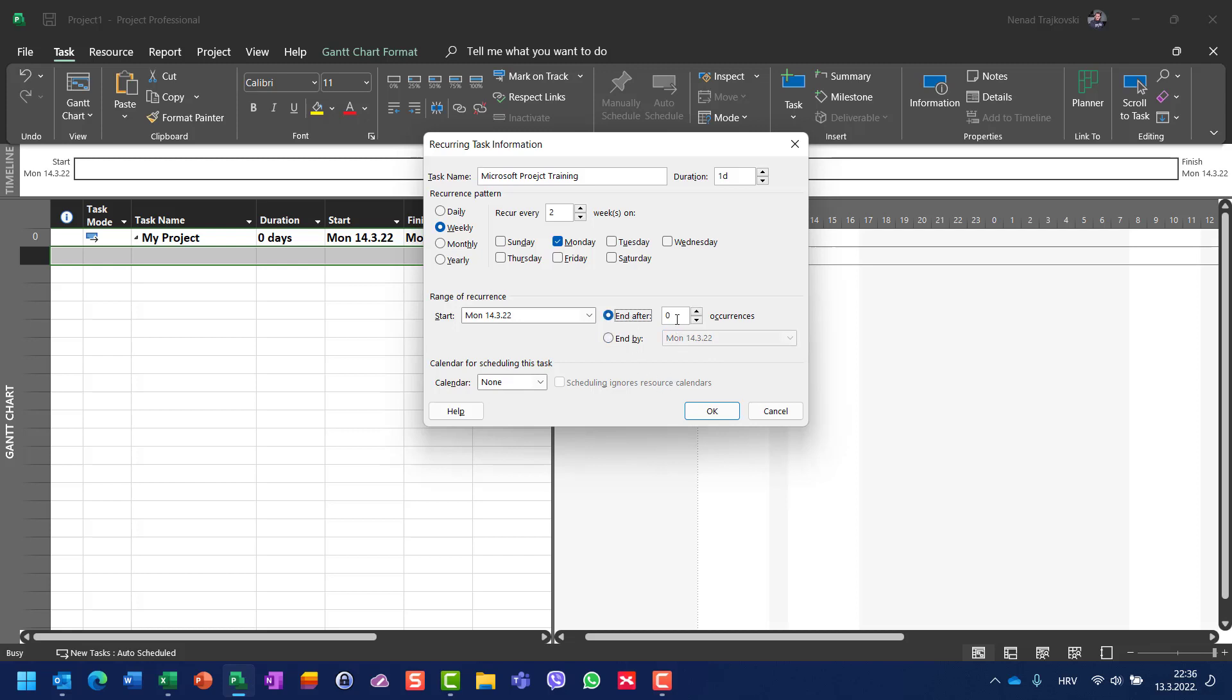For that purpose, I will say I will have four occurrences because the training will be after four occurrences, and I will hit OK.